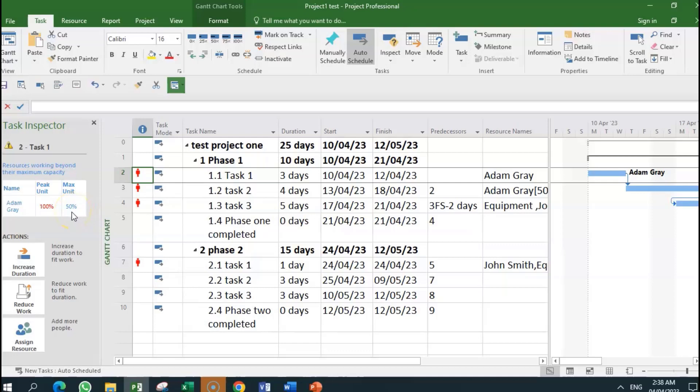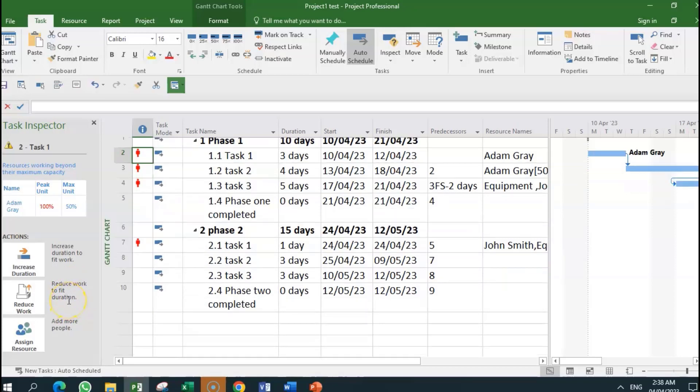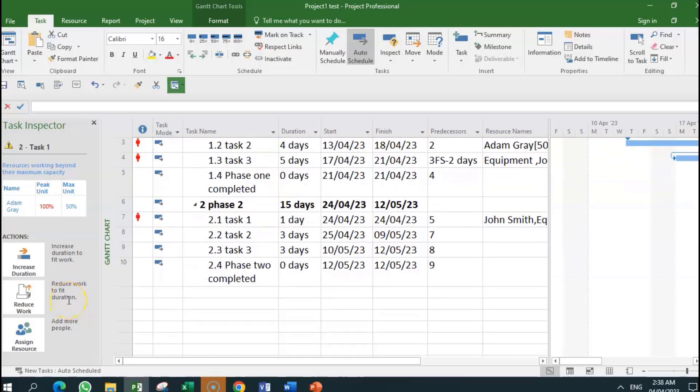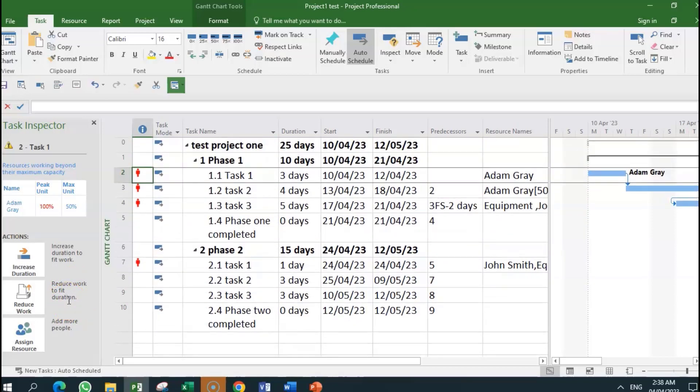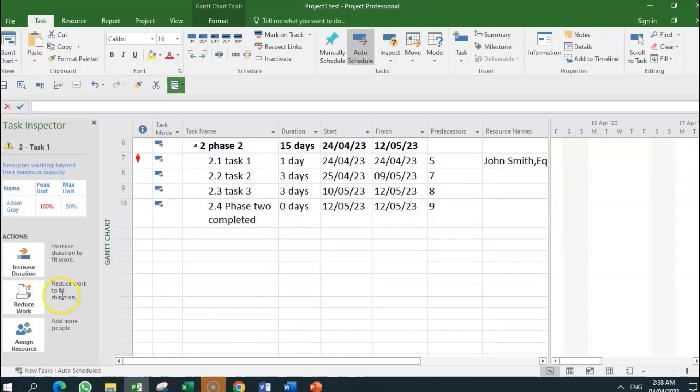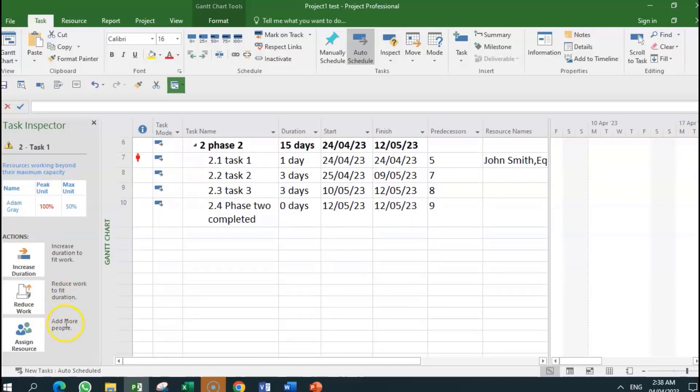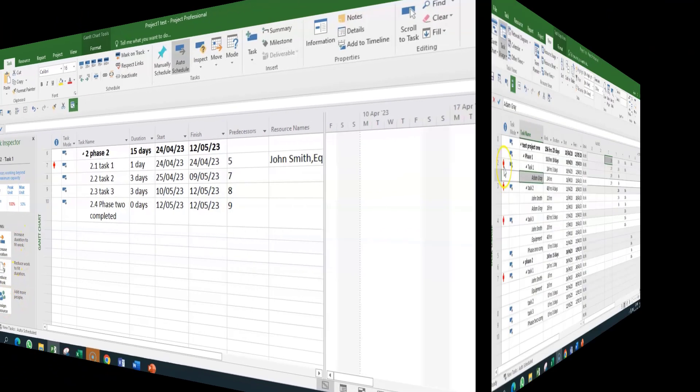Reduce work to fit duration, which is to reduce from the amount that he's supposed to work to a lesser amount so that we reduce work to fit the duration. So if he has, for instance, three days and he can only work 50% of the time, which is four hours per day, so you reduce the work to 12—four by three—or add more people. And we're going to look at some of these options later on.